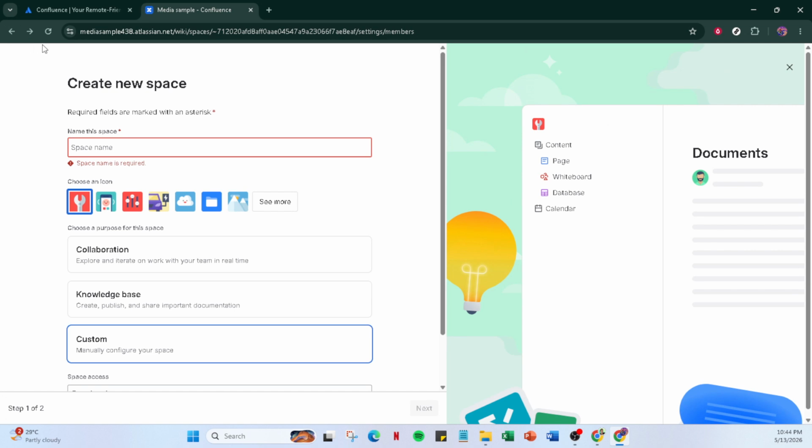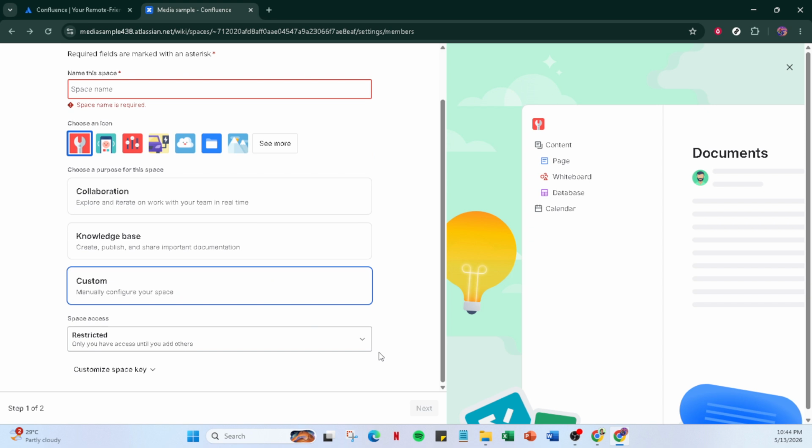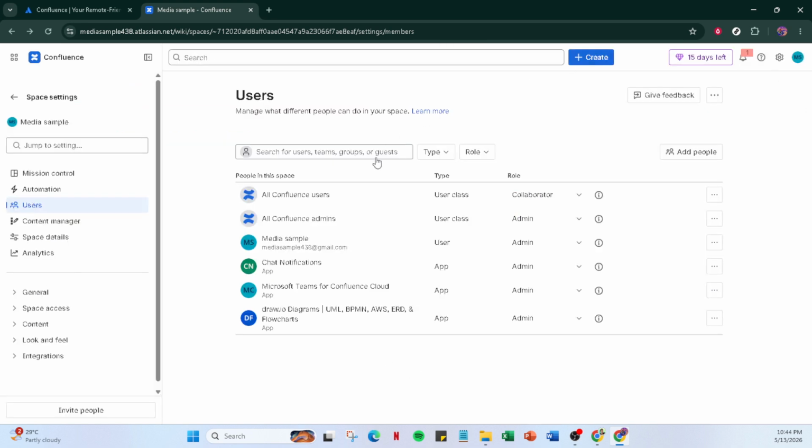Use helpful macros to surface live signals. Insert a status macro to show whether the project is on track, at risk, or blocked. And add a short note explaining why. Standardize your status labels and colors so updates are consistent across pages.